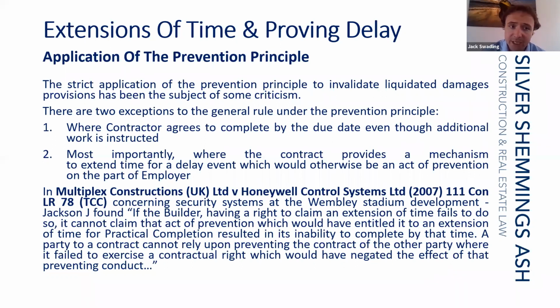As mentioned here, the strict application of the prevention principle is being subject to criticism, and that's just because it's so absolute. A very minor act of prevention that does not provide entitlement under the extension of time provisions to the contractor can put time at large and really put the employer in a very difficult position.